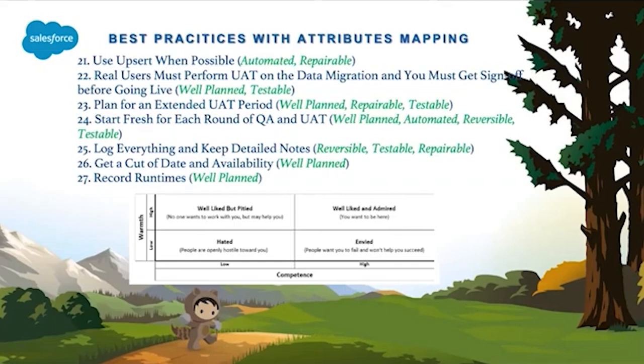So it is always advisable to identify the real users at the stakeholder level during the planning stage itself, and to get the sign off when it comes to data migration. As we recommended earlier, use the full copy for your data migration, and ask the power users to validate everything in the full copy, because the full copy is an exact replica of production.